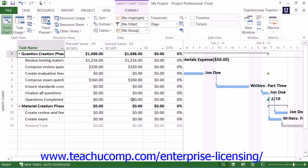You'll also see the Schedule Variance, which is the difference between the EV and the PV values; the Schedule Variance Percentage, which is the ratio of the SV to the PV expressed as a percentage; and the Schedule Performance Index, or SPI, which is an index value that shows how many cents of actual worth was accomplished by the status date for every dollar that you planned to spend.